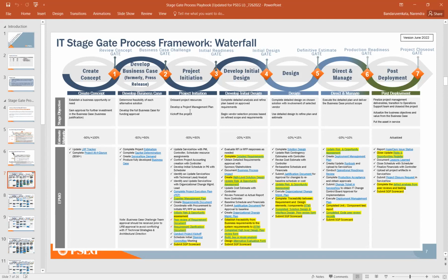For those detailed requirements that you have captured under the project initiation, how do you design the solution? Right? You will have technical SMEs, the technical teams, your lines of businesses to provide you the business knowledge. You start discussing about the initial design, discuss with the vendors about the proposals, etc. Again, the estimation is improving here to minus 20 to plus 30%.